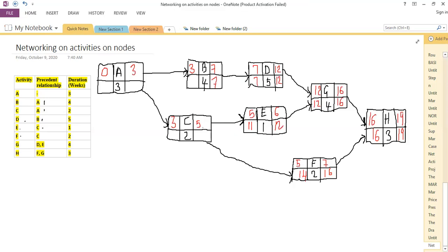Here we need to do a comparison because of these two arrows. As you can see, there are two arrows here. So we'll compare, as we pick the smallest figure or the smaller figure. 11 and 14. 11 is smaller. We go for it. 7 minus 4, this will be giving us 3. 11 minus 2 will have, is it 9?